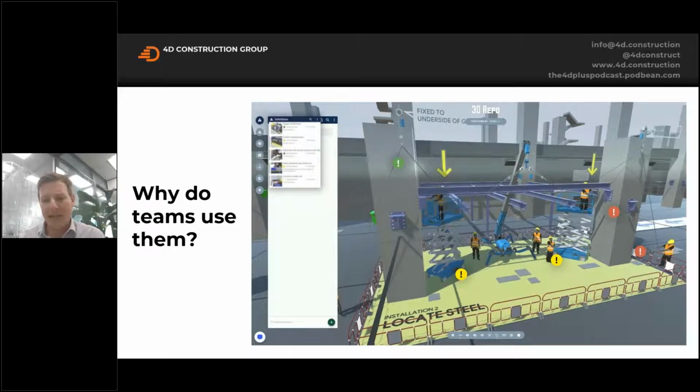It needed to follow a certain sequence, but our primary objective was to look at the safety of the workforce. So we went to the extent of modeling the spider crane that you can see there. We modeled the mutes and we positioned our operatives to make sure that we knew exactly how many people should be involved, where they should be standing, and to then refine that process to make sure that it was as safe as possible.